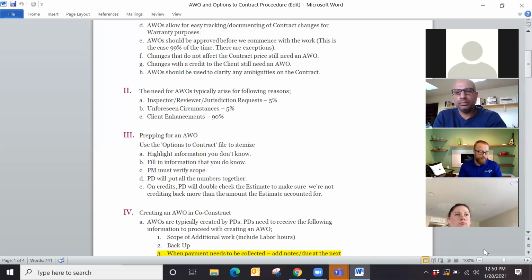So in some of the examples that I have, of what we went through over the past year, we went into a project where we were doing a whole new floor all the way across a client's first floor, which was all going to be hardwoods. It was going to be an engineered, floating floor over a slab. We needed to break up that slab to access the main sewer line to connect our new kitchen. The only spot to actually connect it, though, was in the floor of a bathroom that we weren't touching. So in the end, we had to break up that tile in that floor to access that sewer line, and we did not do an additional work order for that.